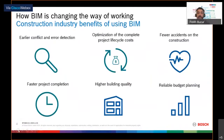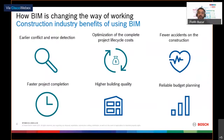What are the benefits of BIM? First, we can have reliable budget planning and optimize costs during faster project completion. We can also detect conflicts — for example, seeing that a pipe is crossing a beam or another construction element that would not be possible in reality. Having all systems and construction elements of a building inside one file results in checking for conflicts and other mishaps that can happen during planning and construction. This can also result in fewer accidents during the construction phase.